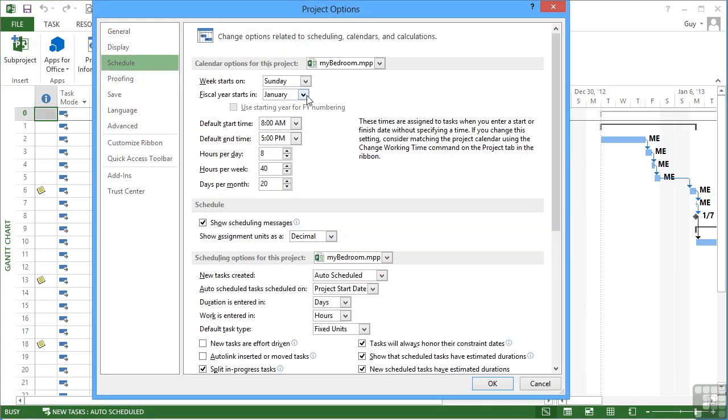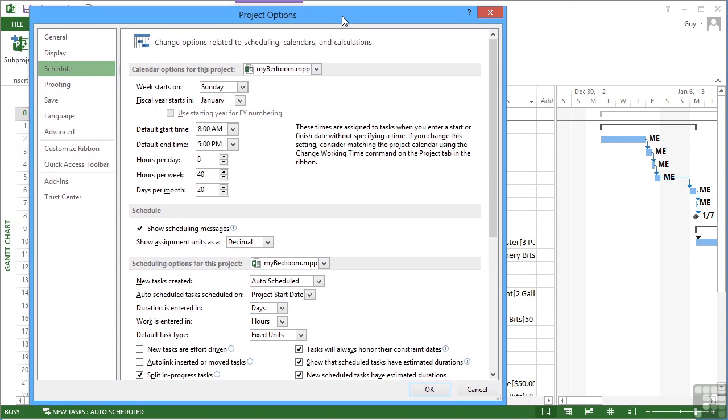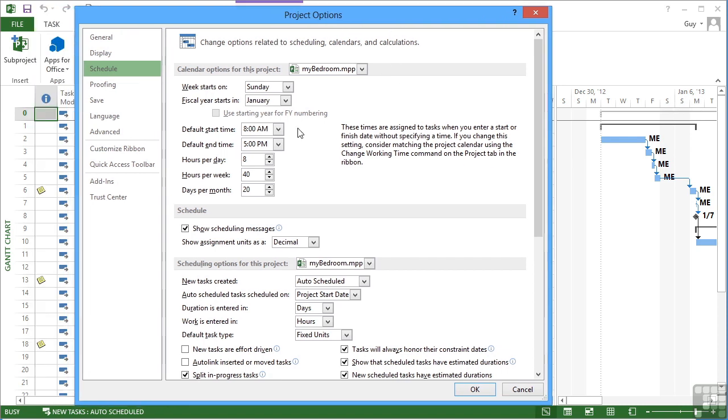Here's our control of what day of the week the week actually starts on, and the default is Sunday. You can see if you look in the Gantt chart here that your week starts on a Sunday - Sunday, Monday, Tuesday, Wednesday, Thursday, Friday, Saturday, and then there's the thicker line before the next week starts.